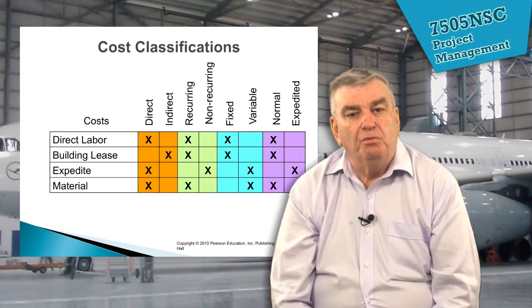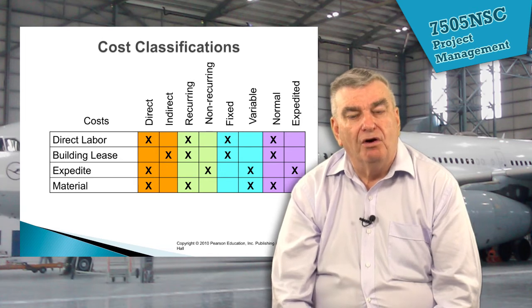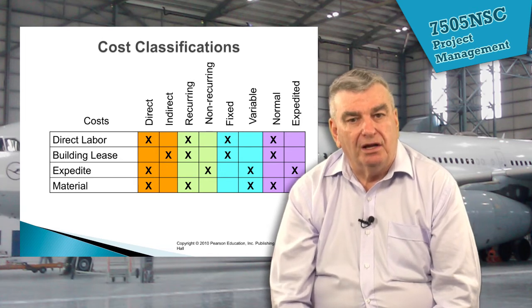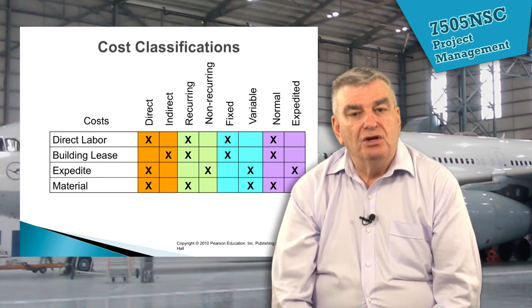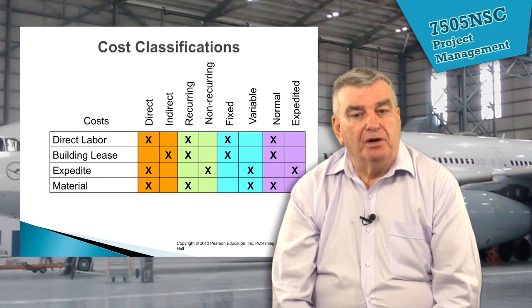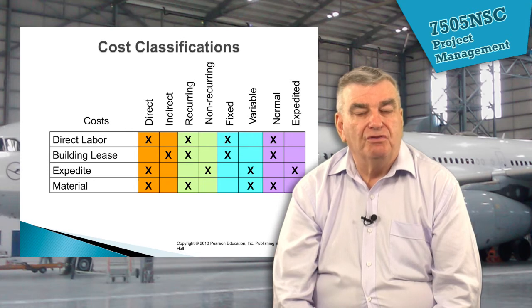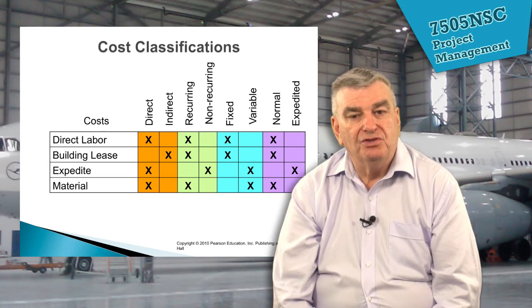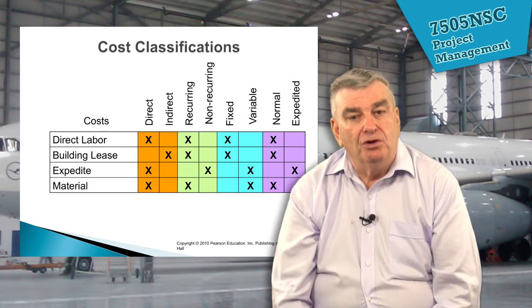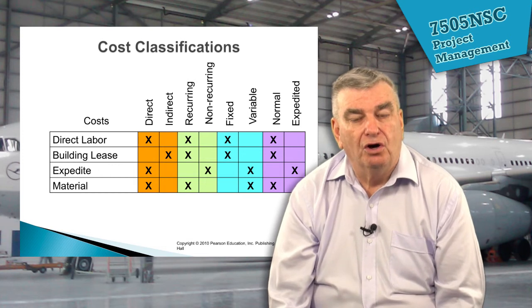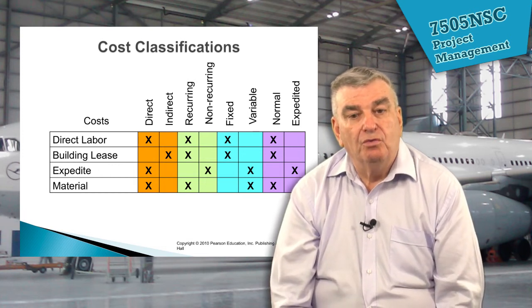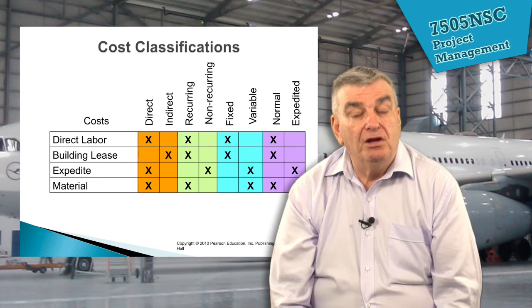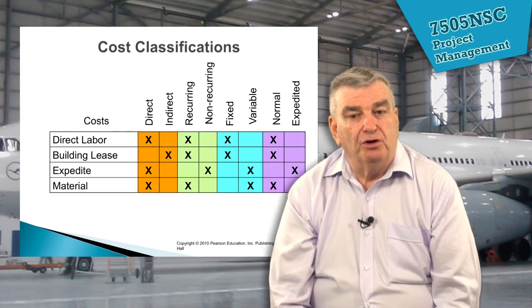We get recurring and non-recurring costs. Non-recurring costs could be research and development or marketing — done one-off. Then you get the recurring costs, such as fabricating part of the fuselage structure for a Boeing 787 prototype. Once you iron out any problems, that becomes a recurring cost when it goes on to the production line.